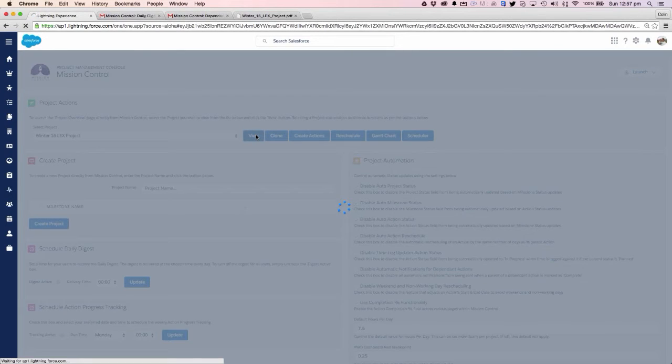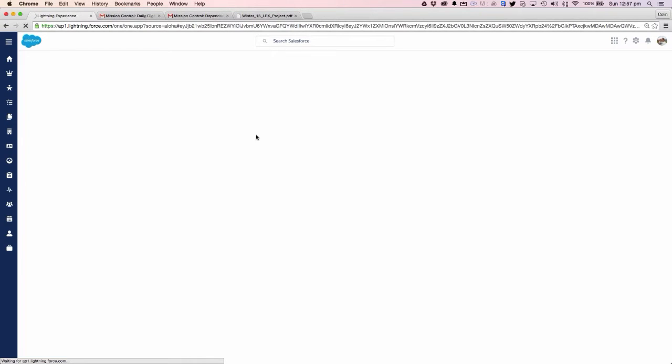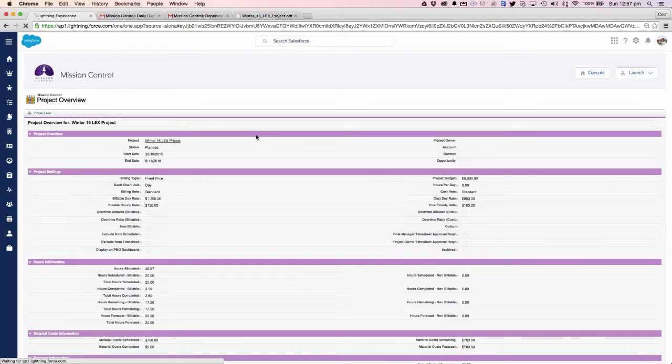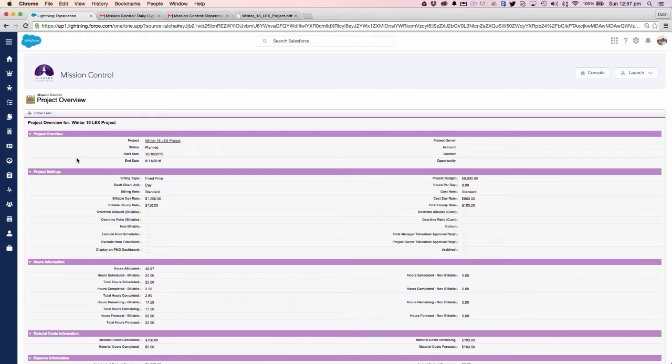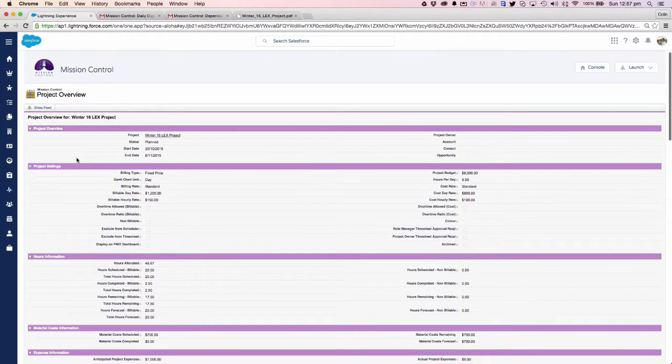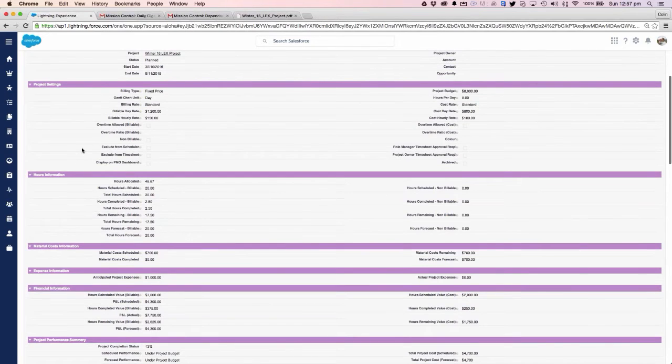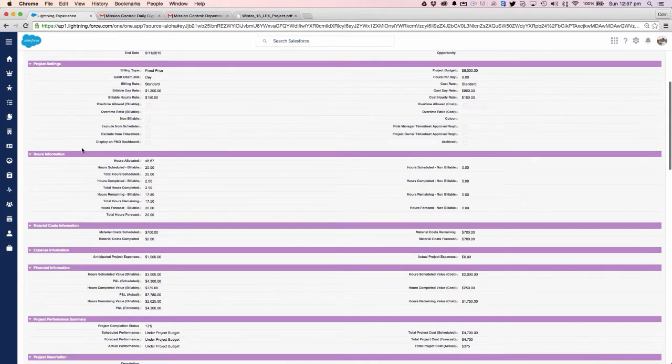The core objects within Mission Control are the project, which can have multiple milestones, and then each milestone can have multiple actions underneath. Each action allows you to log the time that you've been spending working on progressing that action to completion.